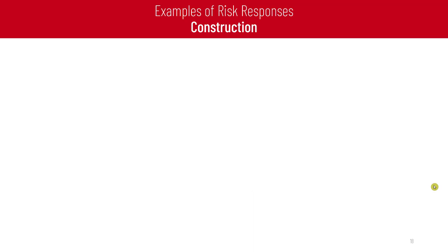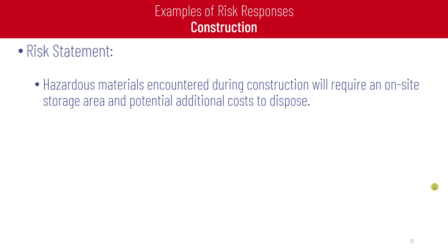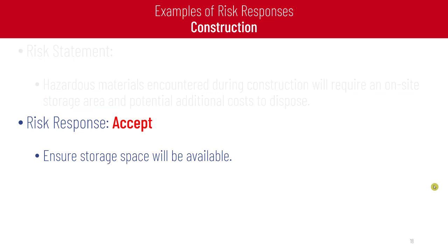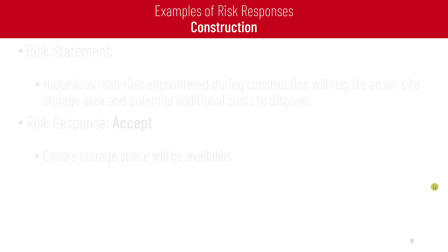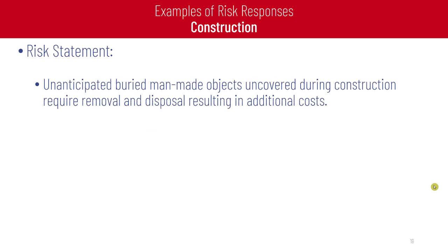The first example of risk response in the construction phase states that hazardous materials encountered during construction will require an on-site storage area and potential additional cost to dispose. The risk response recommended for this risk is accept, meaning we ensure storage space will be available.